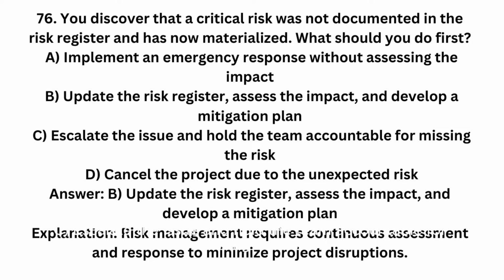C. Escalate the issue and hold the team accountable for missing the risk. D. Cancel the project due to the unexpected risk. Answer: B. Update the risk register, assess the impact, and develop a mitigation plan. Explanation: risk management requires continuous assessment and response to minimize project disruptions.